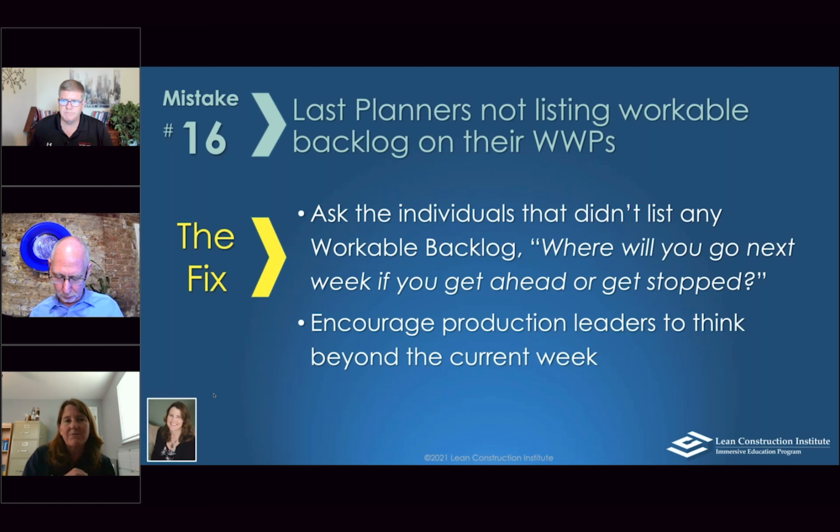And the reason I like people to say it out loud in the meeting, a lot of people have it in their little pocket, here's my plan B, here's what I'm going to do, is because first of all, I want to know as part of the leadership team that you've been thinking about it and it's been planned. But second, you may think it's okay to do that work if something happens, but the electrician may disagree completely with you. And so say it out loud. That way the rest of the team has an opportunity to say, well, nope, that's not going to work.